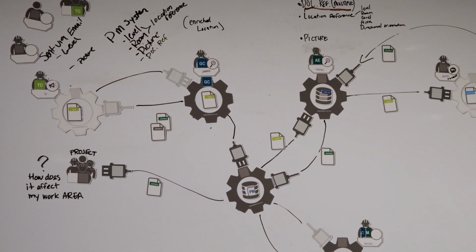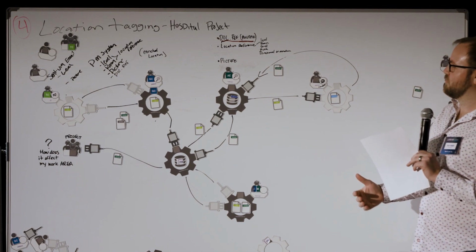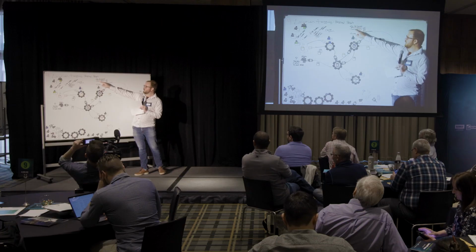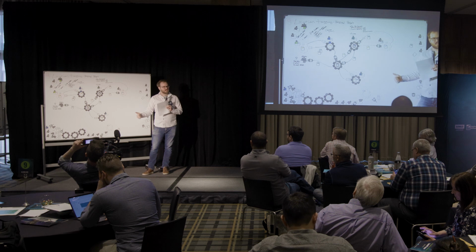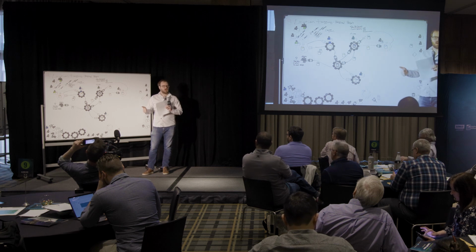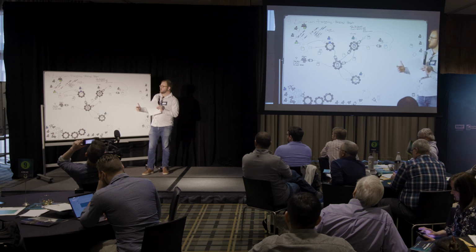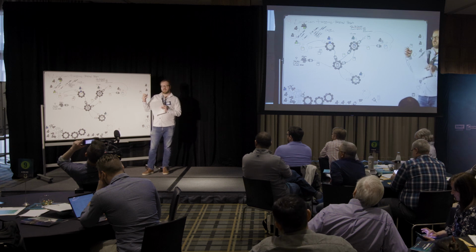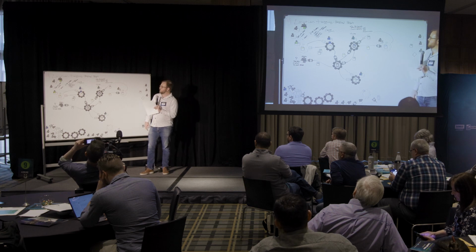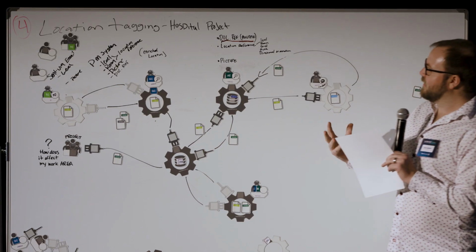And again, we have another refinement of information, right? We're taking one document reference and we're splitting it into multiple because the architect has to send it to the MEP engineer, and different engineering types need different documents. So they're taking that location and now they're applying it from that one A201 to the different types of documents for the people that they're sending it to. But they're expanding that out more, right?